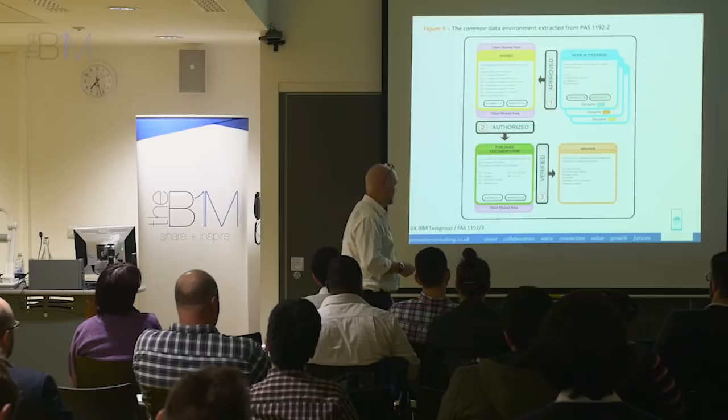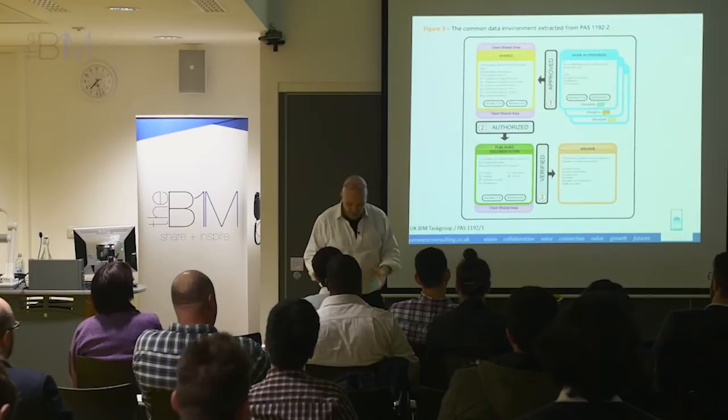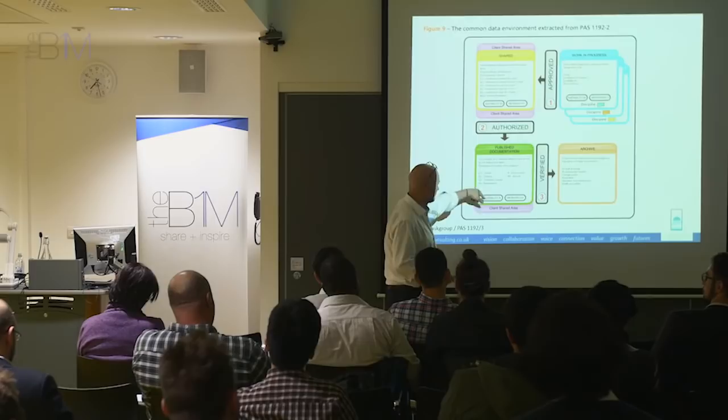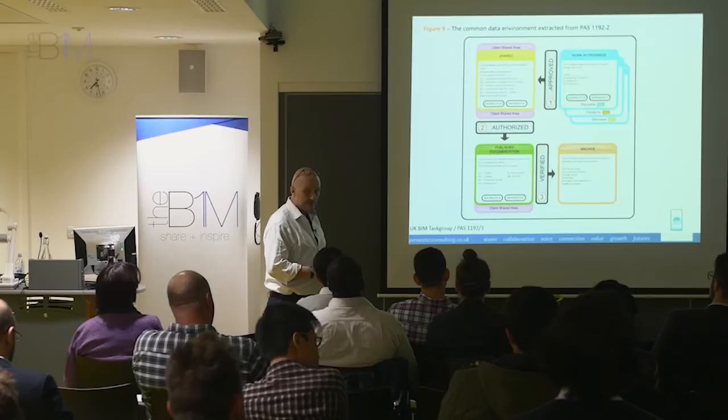And we publish it. So that is put up in the client shared area as reliable information that crystallizes the design of that aspect, whatever it is, at that point. And it can be used in a certain way, which is defined by the way it's issued. And then when it's superseded, it gets archived. And really, this is what we've always done anyway, it's just they put a name to it. And that's all I'd say about this.